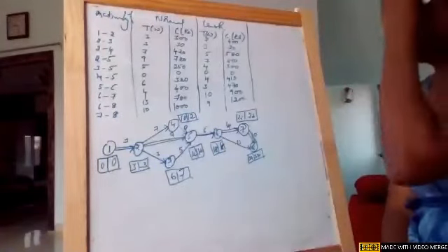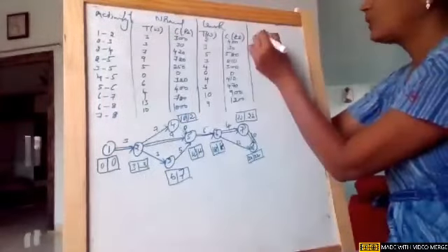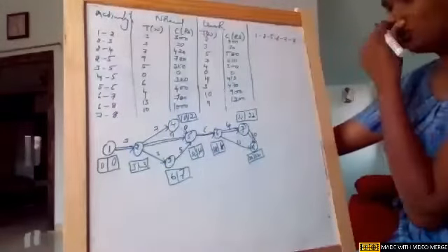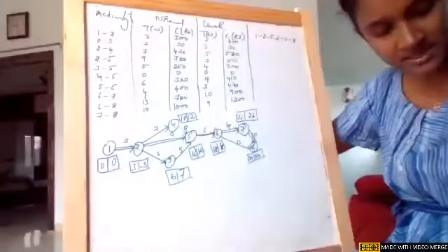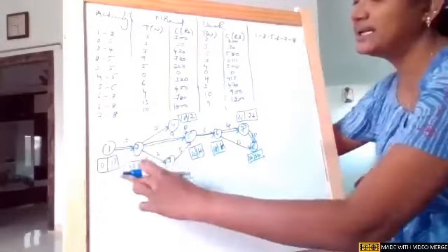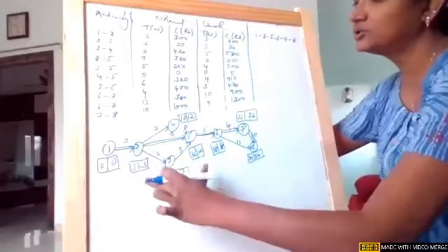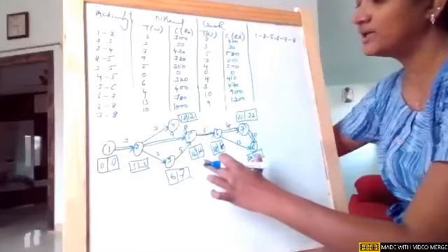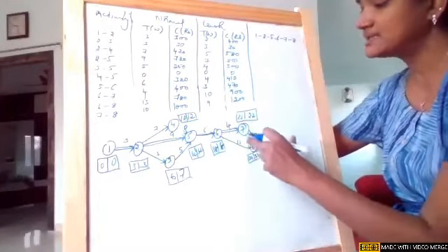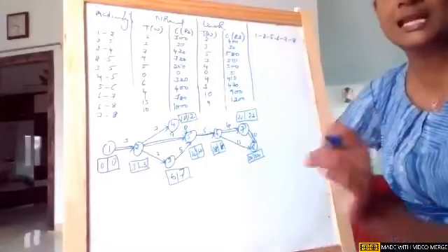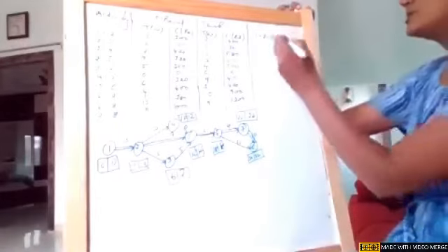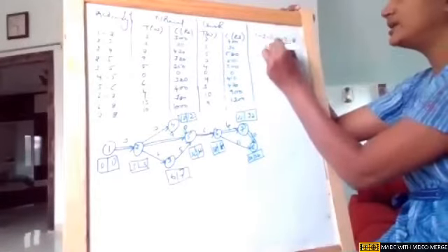Okay, so the critical path here is 1 to 2 to 5 to 6 to 7 to 8. Girls, in notes, when I shared multiple critical paths, ignore that. I covered all the nodes where earliest and latest times are equal. You can see this 1, 2, 5 is another node where earliest and latest times are equal, and 6, 7, and 8. I just didn't take this path 6 to 8 to reduce one of the crashing steps, to save time. So this is the critical path with a duration of 32 weeks.